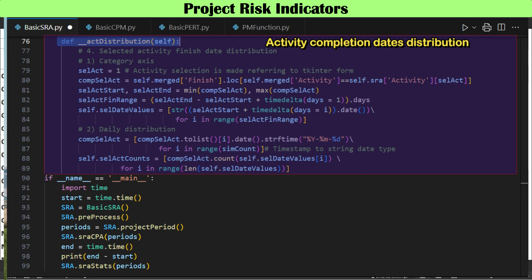A likelihood distribution and cumulative distribution of a specific activity's completion dates is another indicator. The number of iterations is counted and stored for each completion date of the activity, and a running total is calculated over the whole activity completion dates range.